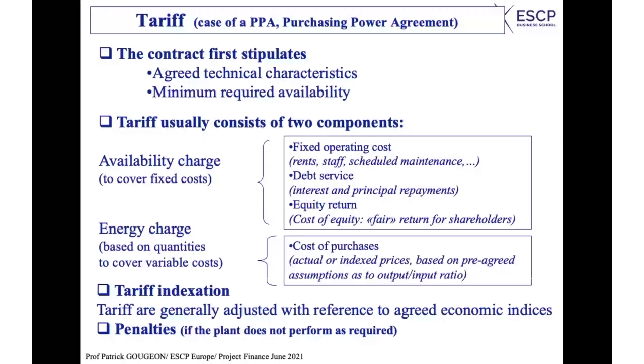Okay, but you see here that you have secured your revenue. Therefore it will simplify your risk analysis because you know already that revenues are fixed, and that most of the costs are covered also. Then you may still have a problem of volatility with the cost, but at least the main source of risk, the revenue, is covered with this type of contract.